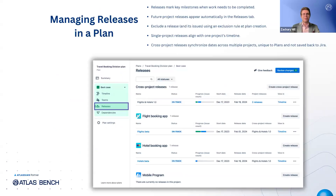Releases represent those critical milestones in your plan when certain work needs to be done. Depending on your context, this could be a shippable product increment, a major feature launch to customers, or a program increment spanning multiple initiatives. Within the releases tab of your plan, you'll automatically see any future releases associated with your projects. If you don't want specific releases or their issues to appear, just add an exclusion rule during plan setup. Plans supports both single-project and cross-project releases. Single-project releases tie directly into JIRA's tracking, while cross-project releases allow you to synchronize timelines across multiple projects, though they remain unique to plans and aren't saved back into JIRA. By managing releases this way, you can keep your team aligned on key deadlines and ensure everyone is working toward shared outcomes.